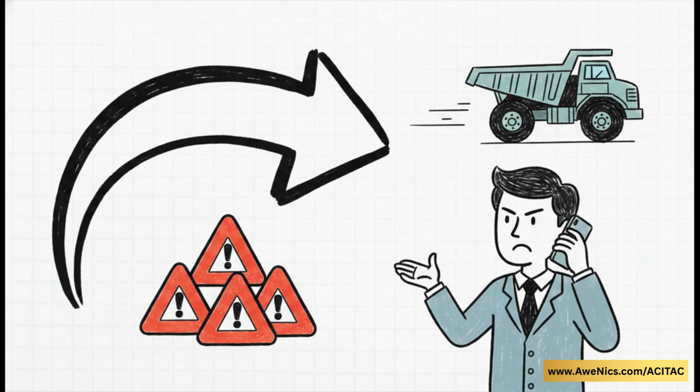And that means utilizing a really powerful feature, clear leveling. If 99 days just doesn't work for you, you hit clear leveling to revert your schedule right back to that 94-day baseline, complete with all those glaring red overallocation alerts. Why do this? So you can explore other actual managerial solutions. Maybe you can't magically spawn a dumper out of thin air, but maybe you can pick up the phone, put some pressure on your external contractors, and demand they bring in extra equipment to keep you on schedule.